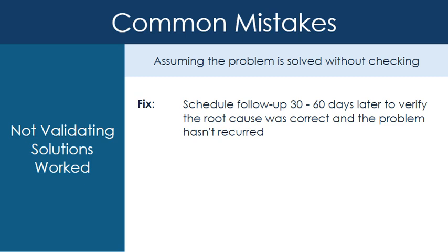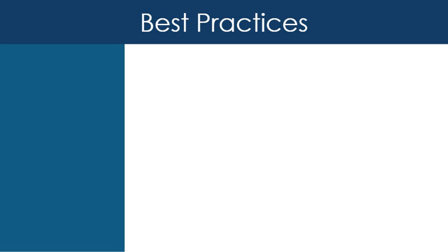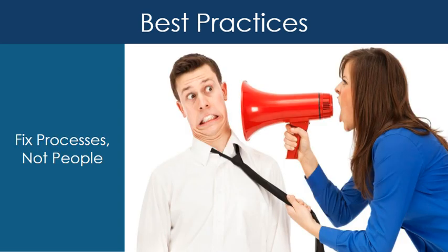And finally, here are some best practices to increase the potential for reliable results when performing a 5 why analysis. Focus on processes, not people. When you reach "someone forgot" or "person X didn't do something," you haven't gone deep enough. Ask why the system allowed that person's memory or judgment to be the only safeguard. Maybe there's no checklist, no automated alert, or no clear ownership. These are systemic issues that prevent problems regardless of who's doing the work.